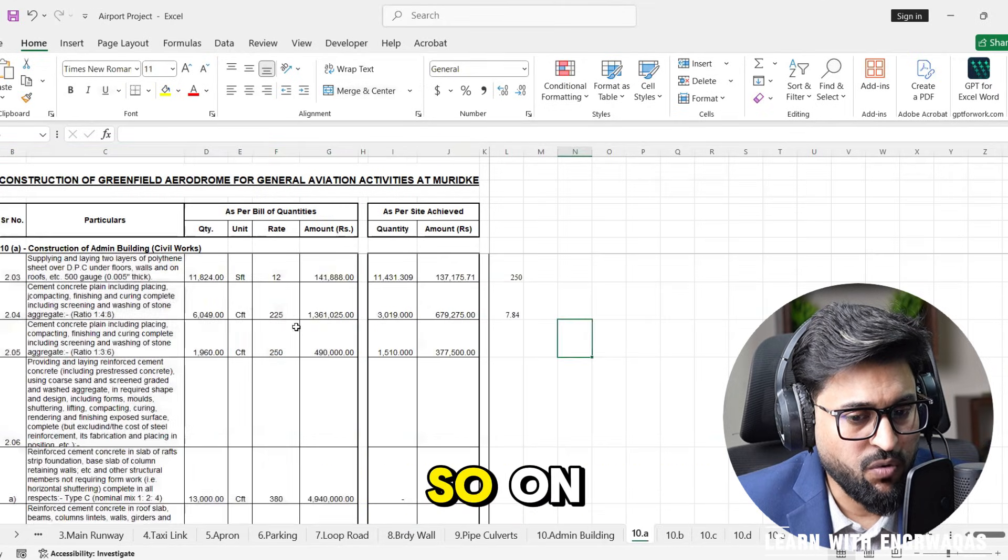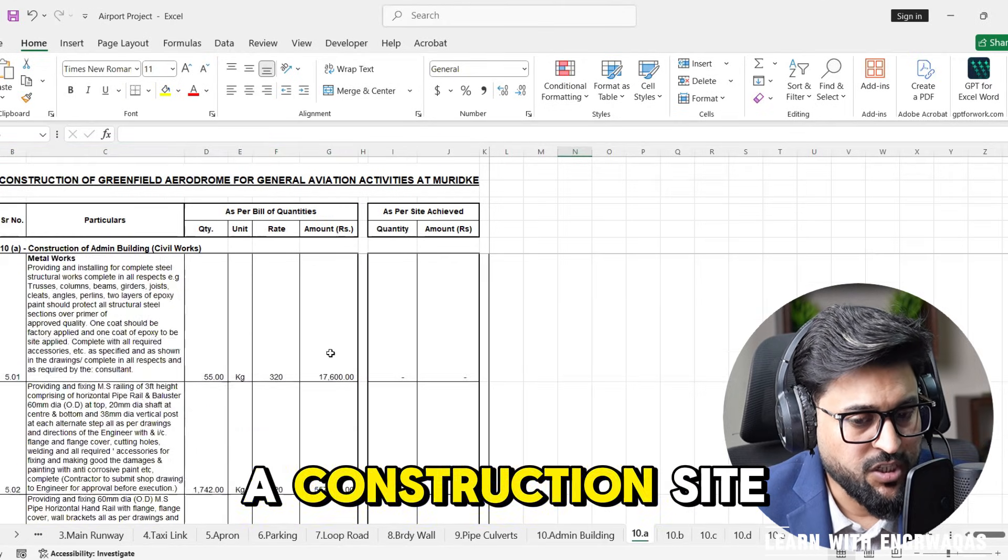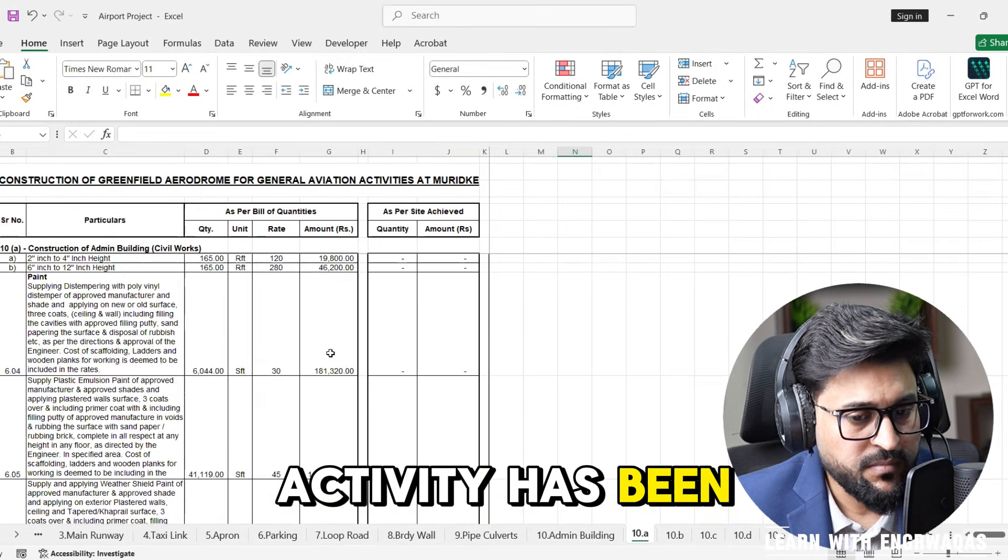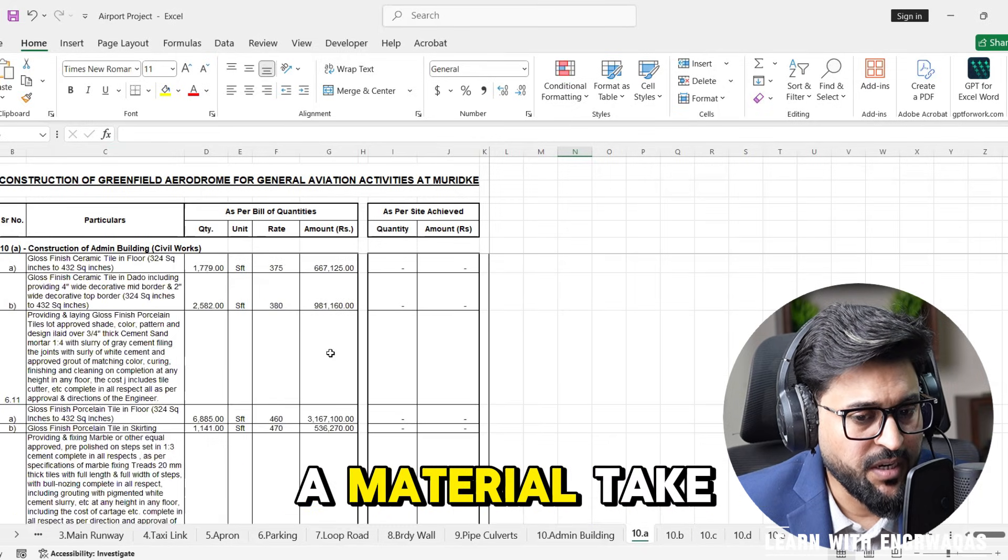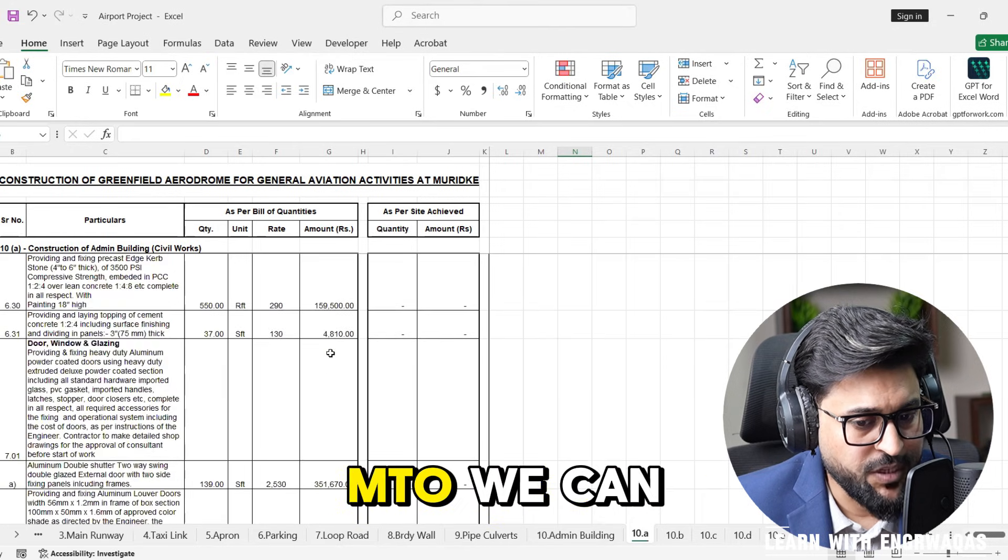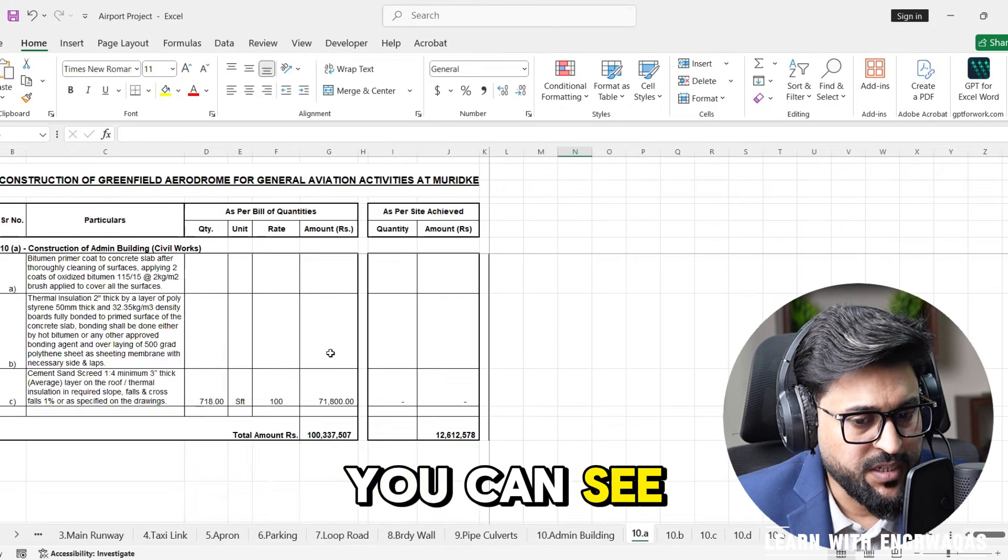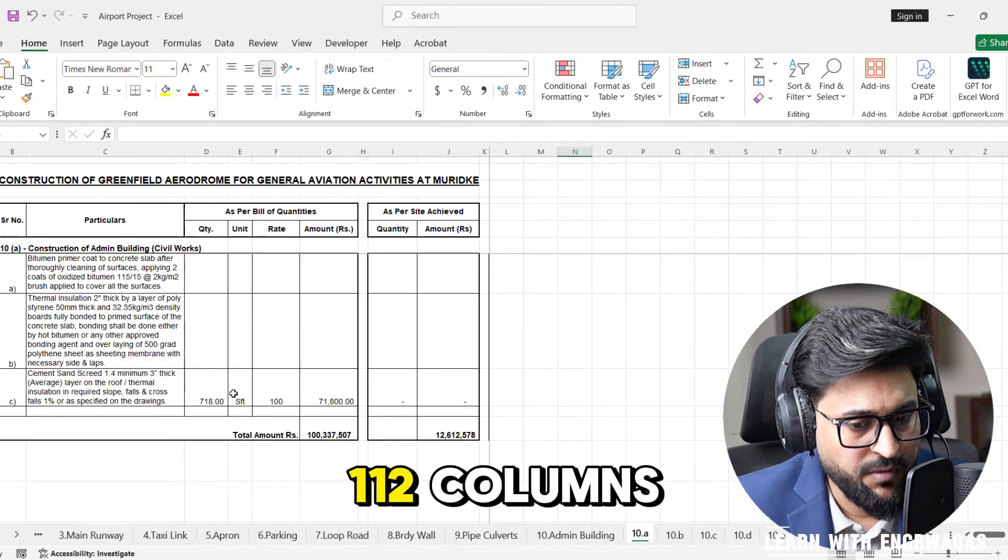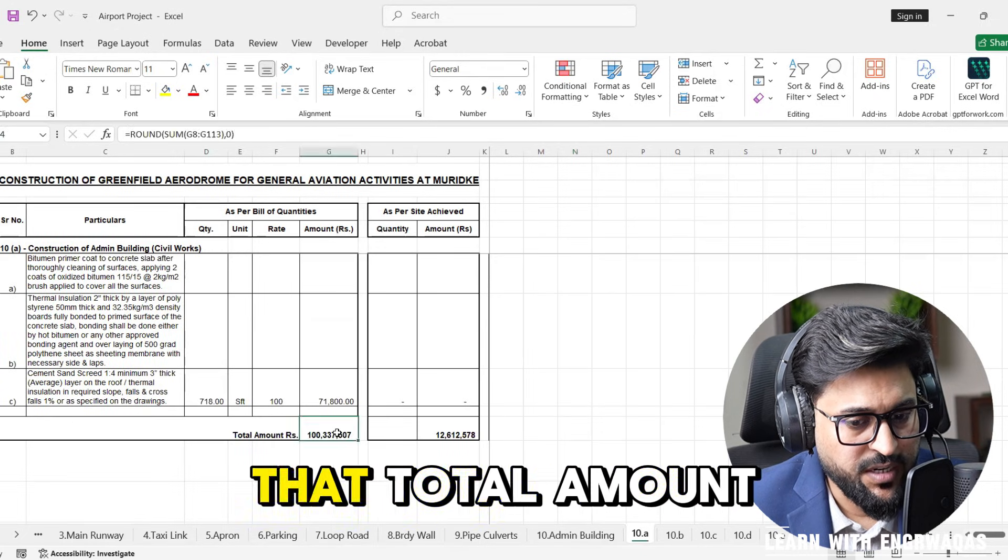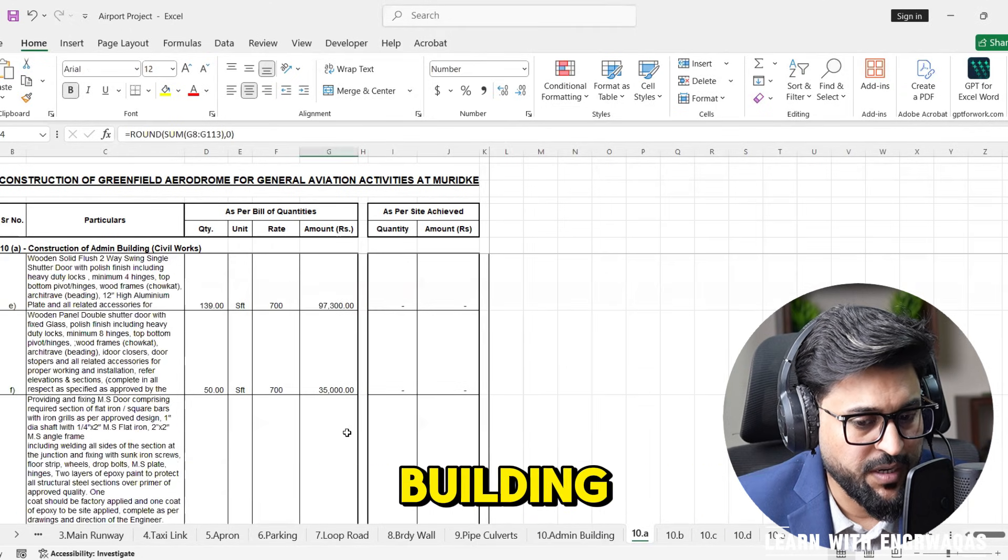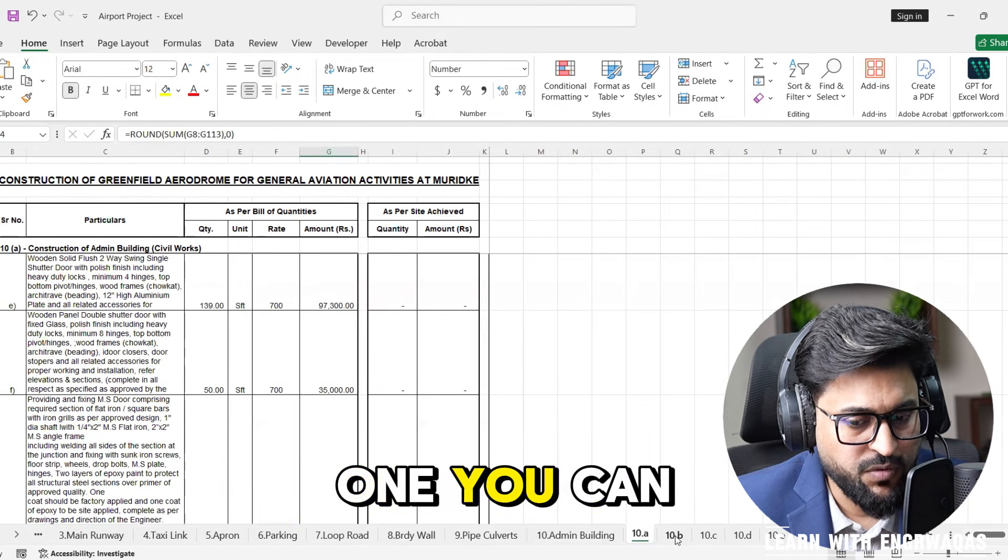You can see every single task or construction site activity has been calculated through a material takeoff exercise, MTO. After having 112 columns you can see that total amount has been concluded to construct this building.